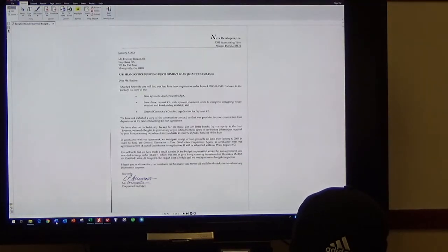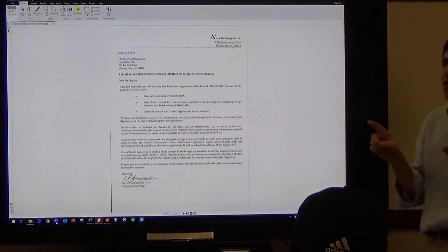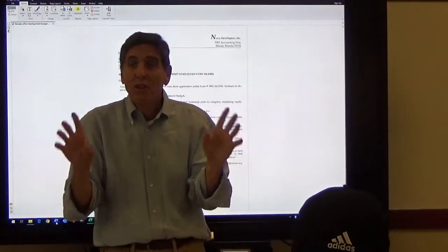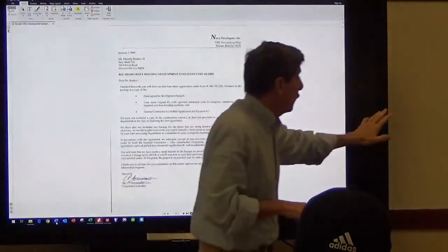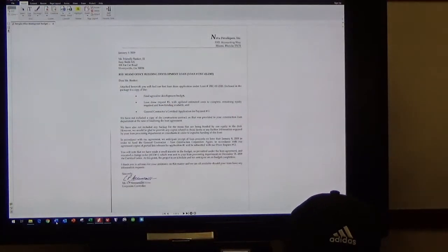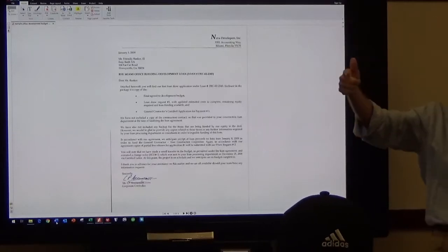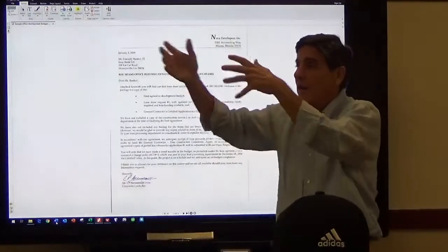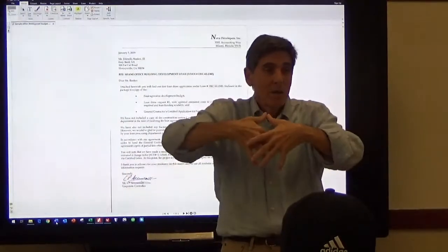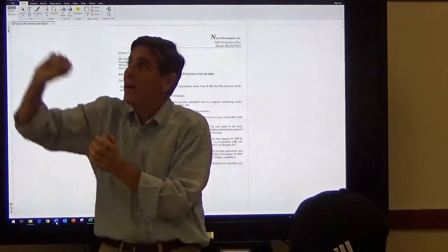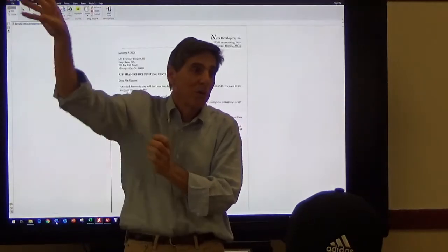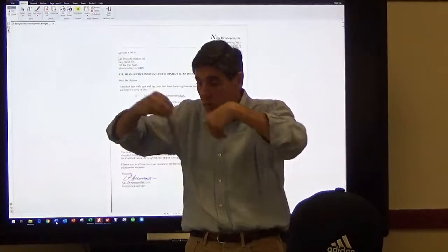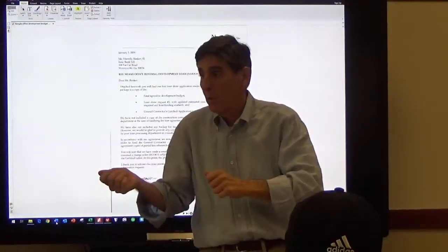But you have to do the same exact circle for all the costs that the bank doesn't cover. Just like you're doing this cycle, you need your architect, your engineer, your surveyor, and any other service provider to send you invoices. You're gathering them, and then you're doing a funding draw to your partners, to your owners, to that 95 and 5 guy every month, so they can feed you and you can pay off the people that are working.